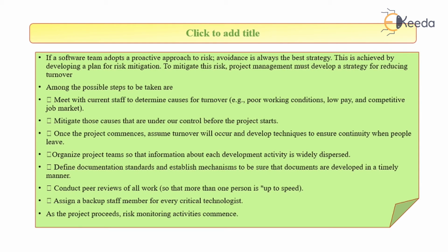Organize project teams so that information about each development activity is widely dispersed. Define documentation standards and establish mechanisms to be sure that the documents are developed in a timely manner. Conduct peer reviews. Assign a backup staff member for every critical technologist. As the project proceeds, risk monitoring activity also commences. This is about the RMMM model. Thank you.